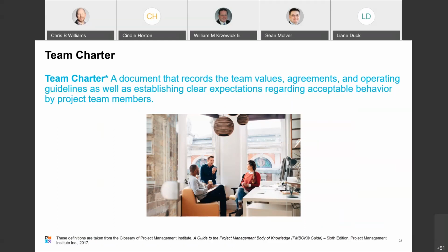And then in the context of managing conflict, it's important to update the working agreements, like the team charter and the other team documents, to provide guidance for how the team should move forward. So we talked about the outputs or the deliverables up at the front of this section, and producing or updating documents like the team charter. If you go through conflict, you learn something new about how the team is operating, you loop back around, you make your updates, so the next time it happens, you have better expectations for everyone. Everybody's back on the same page.